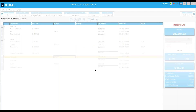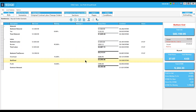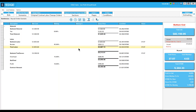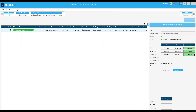At the moment the changes I've made to the wages as well as the markup changes are only for this change order. However, if I accept this change order, those settings will become the default for future change orders. So when I come back to my change order screen I now see the numbers for my change order, and I'll check it in.